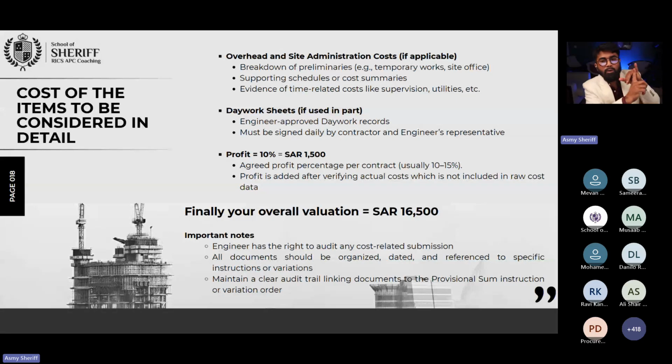So you have calculated all the labor, material, plant, subcontractor, your overhead, administration, any portion of the work executed through day work schedule, and finally, your profit. Normally, in this region, our profit margin is what? Roughly 8, 10, 12, maximum up to 15%, right? That's what the contractor will try to take. Contractors, owners, as a profit, solid profit, they will try to take this amount of money.